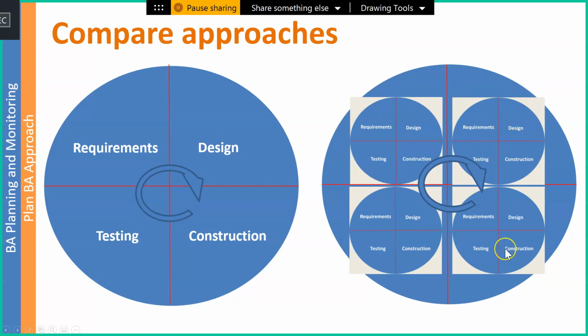And then by the time I hit this cycle, I'm probably fixing things from the previous cycle, right? So on and so forth. So predictive assumes I get all of it all up front. On adaptive, I do my strategy up front, but then my iterative implementation of value occurs over time in smaller chunks while I learn from it and adjust.